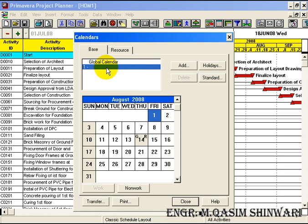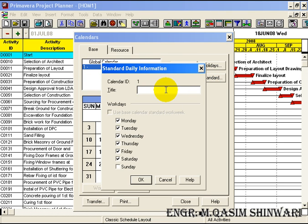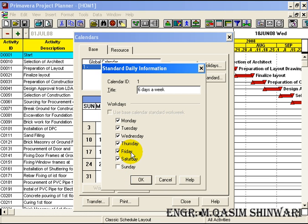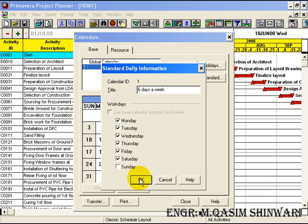Let me change the name of the first calendar to '6 days a week'. Here you can change the non-working day. For example, I want to make Friday the non-working day, so uncheck Friday and check Sunday. But in this case we have Sunday as the non-working day or holiday. Click on OK.